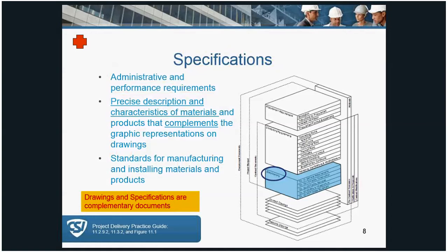Here's another image of it using our lineal process of where the specifications are. Now, it's important that you understand that drawings indicate the quantitative, meaning the size, shapes, and forms, and the specifications specify or indicate products and materials qualitatively in such detail that can be easily understood.